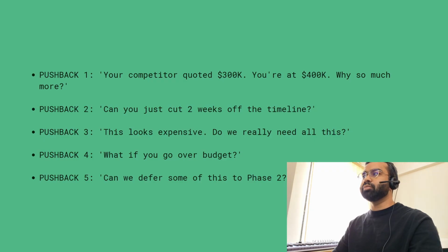Are we behind budget? We have a formal change request process. If the client asks for anything new, we file a change request. You see the cost and the timeline impact upfront. If we hit the risks and the contingency gets used, we communicate that immediately. We don't hide overruns until the end. So the chance of going significantly over budget is low, and if we do, we know about it early. Client feels confident after hearing this, and they get to know that you are being disciplined.